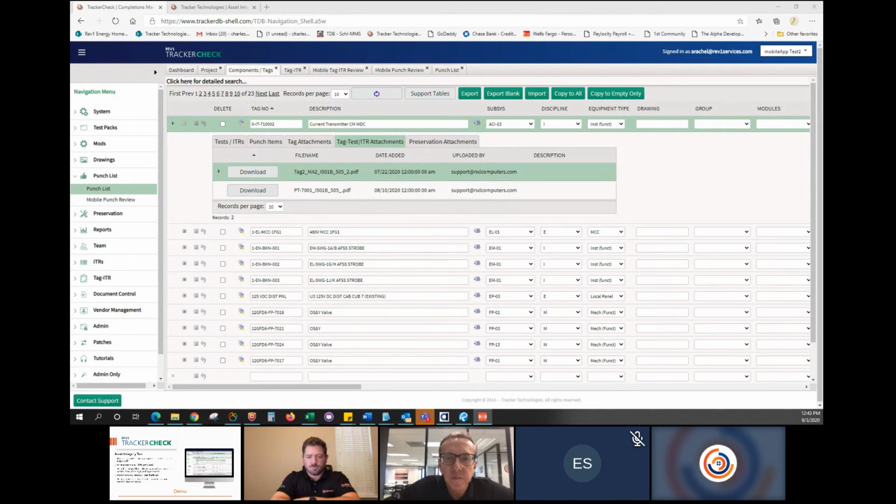If the company allows it, and that's key, we can push data back into Primavera as well. So during the schedule reviews, everybody's updating all the dates. The scheduler goes back, updates Primavera for the next week, and then pushes it out to everybody. We can consume that data electronically, either through spreadsheets or directly tying into Primavera with APIs. And if allowed, we can change our own dates.